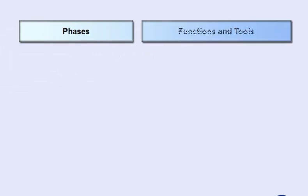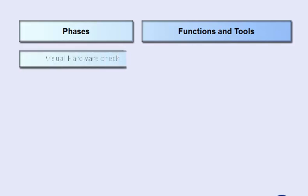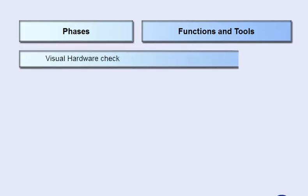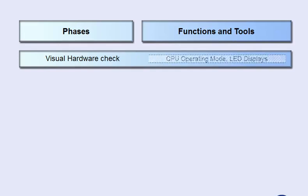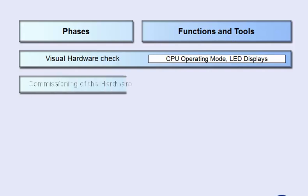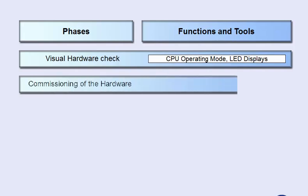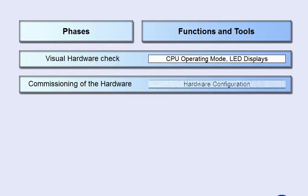The commissioning process can be divided into several activity phases in which various testing and commissioning functions are used. During the visual hardware check, completeness and installation of the automation devices are checked and subsequently switched on. The display elements on the modules give you the initial diagnostic information. While commissioning the hardware of the automation devices, it is mainly the parameters and wiring of the modules that are tested using the editor of hardware configuration.